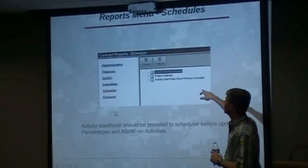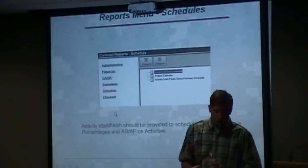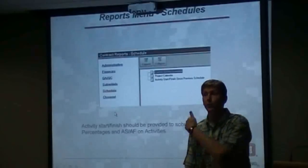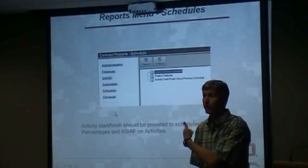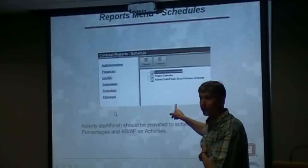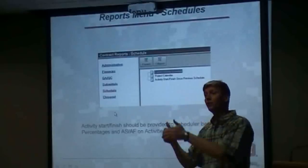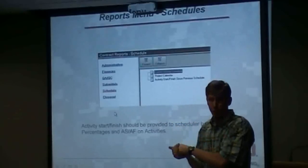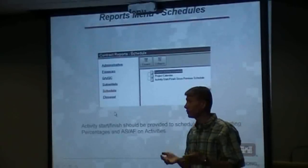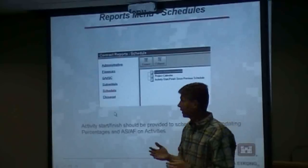The last one there is activities with start and finish dates since the previous schedule. This is the one that will get you in trouble if your scheduler is not reviewing this report when he's doing his monthly update. You need to run this report and give it to the scheduler. As the scheduler statuses the schedule, he needs to use the actual start dates that the QC used — as long as the QC's right. Otherwise you need to get the QC's corrected and get the scheduler's right.